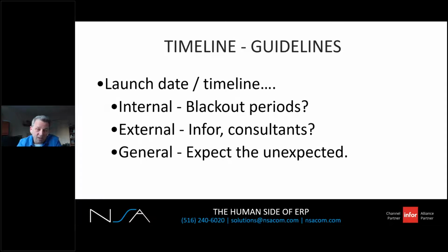A few things to keep in mind. If you want to launch in September, you're going to be affected by your summer vacation. You may be willing to give up your summer vacation this year, but you've got dozens of people involved who may feel differently. January launches are affected by December holidays. So launching Jan 1 may not be a great idea. And how about the blackout periods of your external resources? Know those as well. Above all, expect the unexpected. Be ready to adapt.